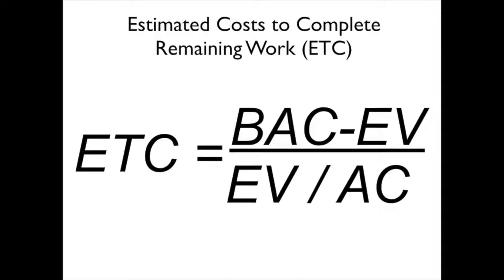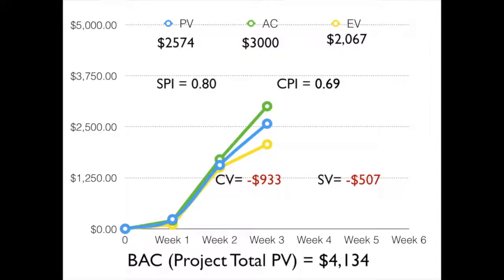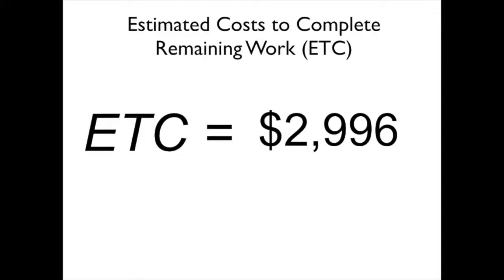is the BAC minus EV, over EV divided by AC. That EV divided by AC is essentially our CPI, so what we're basically doing is applying our current CPI to the remaining work, and then we can come up with a value for what it's going to take to actually get that remaining work done. In this case, we calculate it out and we get an ETC of $2,996.